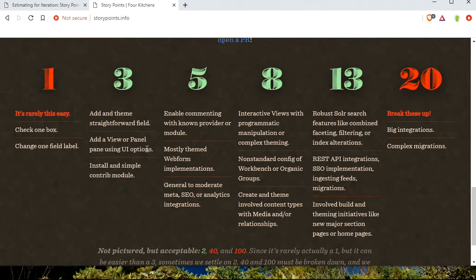So with all of this, when I made this I went through our Jira backlog across all projects and just started pulling tickets for sizes. And while you and I might disagree on how many hours a particular feature might take to build, if I can read any of those, say, adding a view of content with a couple of options, even if I don't know how to do that, I can see that it doesn't sound any more complicated than last week when we added a new content type. But we would also probably tend to agree on something like a huge migration coming from something in Visual Basic that's going to take 1 million years. It's like, okay, that's going to be a 40-point story.